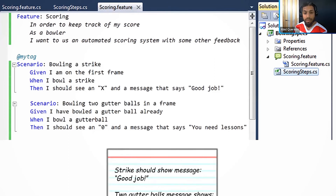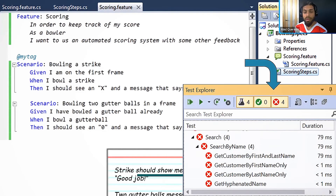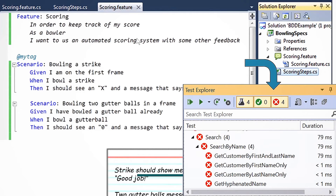You work on a feature-by-feature basis, and as soon as tests pass you have something working that the customer agreed to up front. The acceptance criteria on the back of a user story card must be automated — so black and white that even a computer can run them. Once they pass, you're done, and you have something releasable. There's no need for UAT because you've already done this with the user.